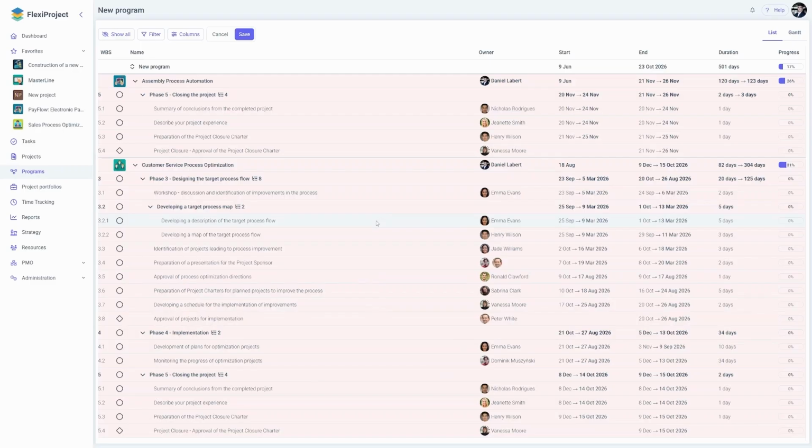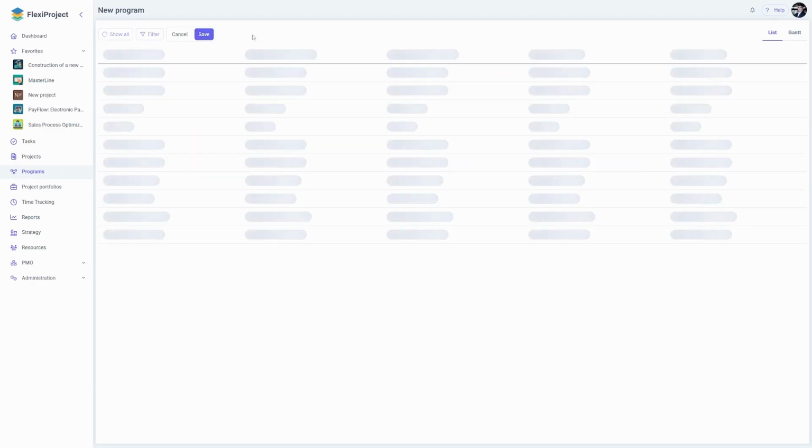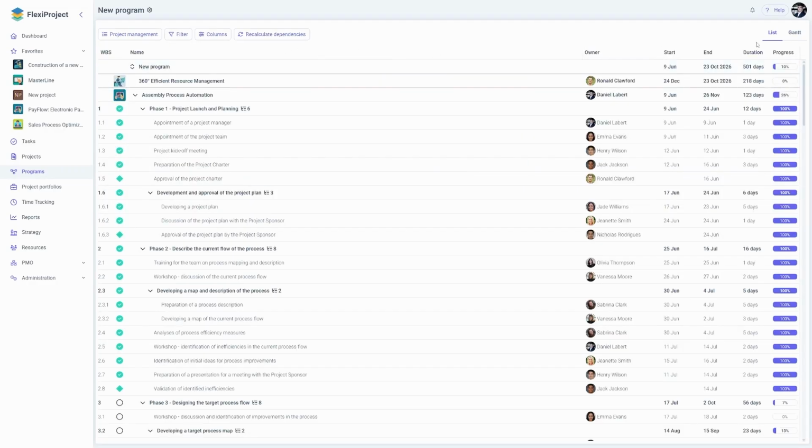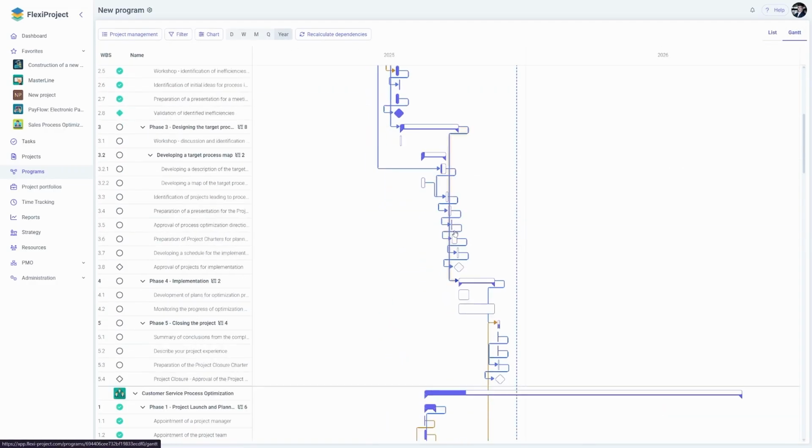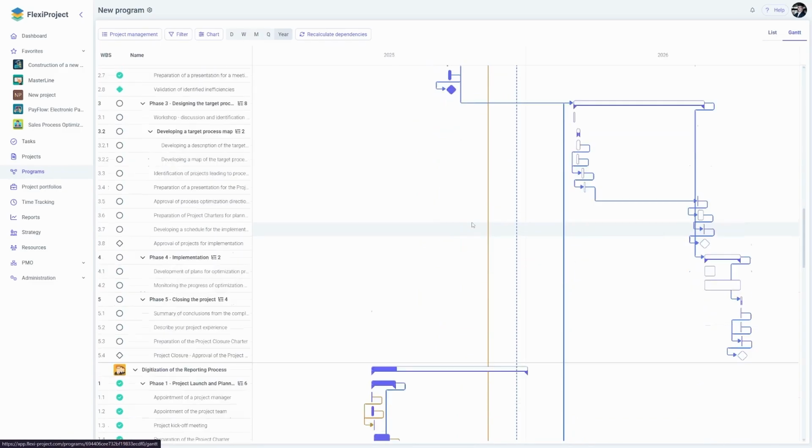It's important to remember that saving this new schedule is irreversible, and it will recalculate all our dependencies. I want that to happen. I have reviewed this thoroughly, and I fully accept these changes. Once you click Save, our schedule changes, and these dependencies are recalculated and defined accordingly.